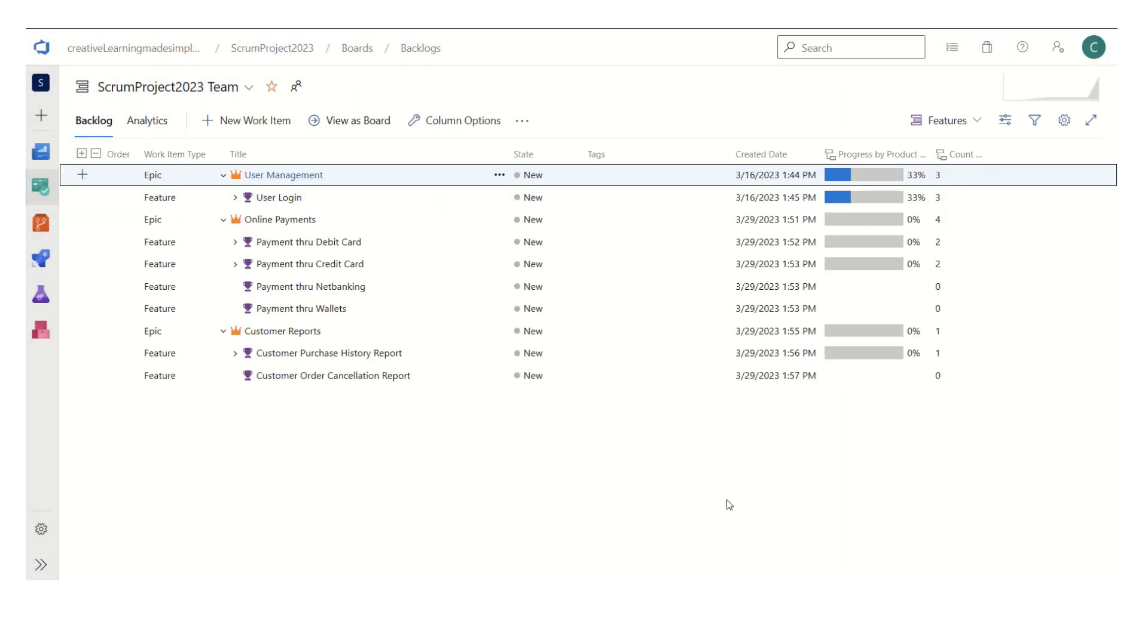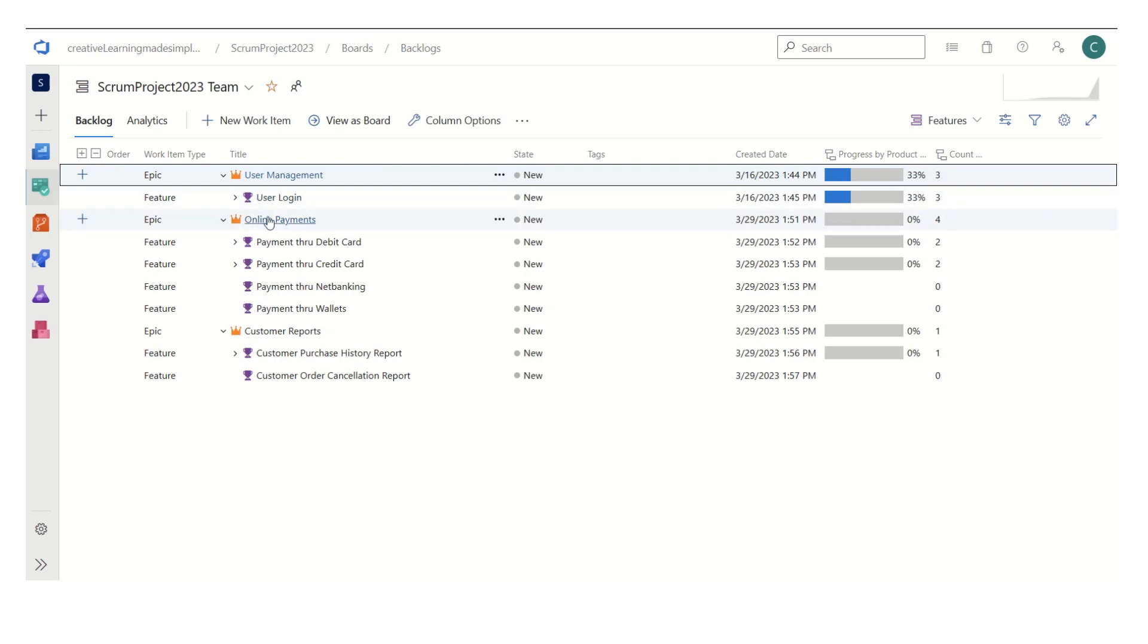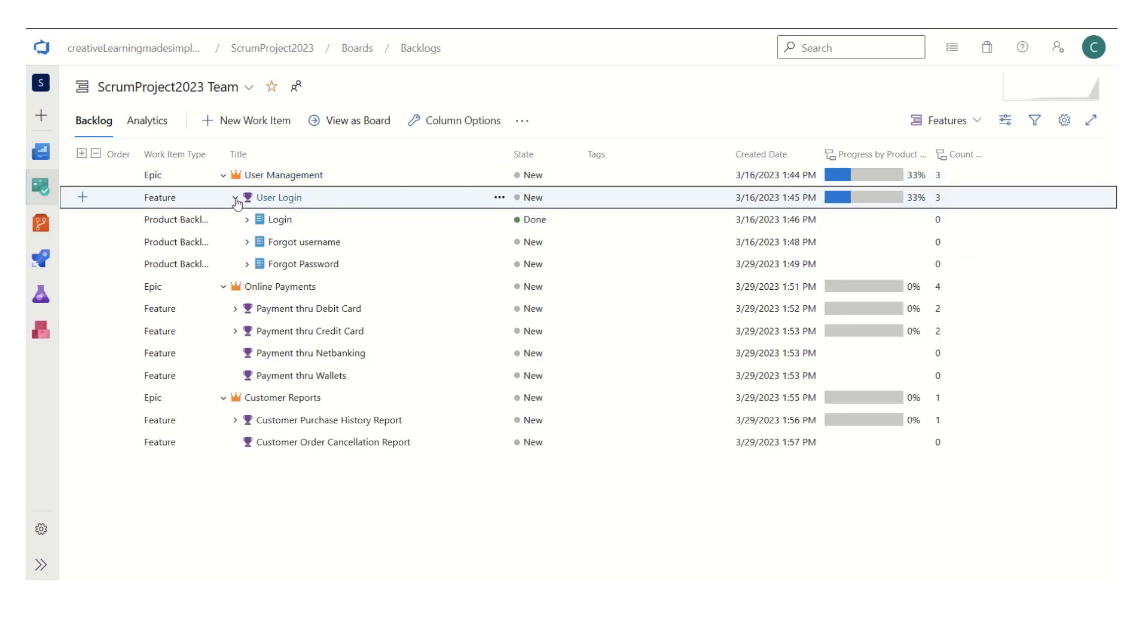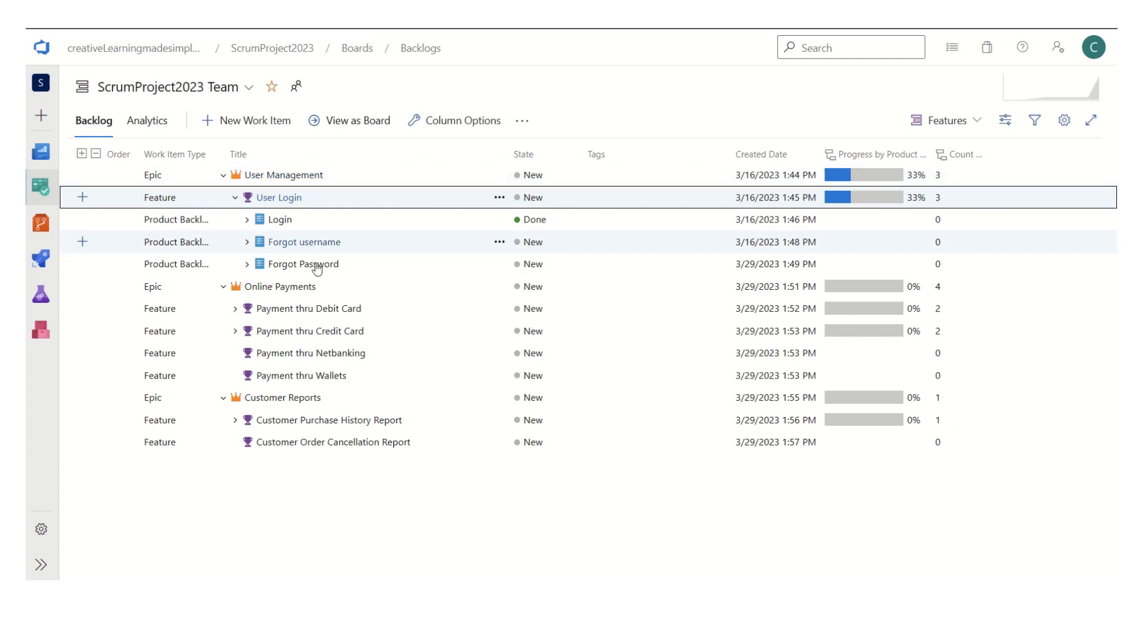this is how it reflects. The very first feature that we have, the user login under user management, it shows like it is 33 percent done. And since this very first epic consists of only one feature, the progress for the epic is also at the same level. And this three is basically the count of PBI, so how many product backlog items are defined under the epic or under the feature. If I simply expand, we have just three PBIs or three user stories under this feature as well as the epic.